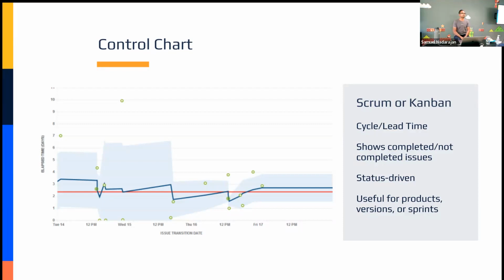That's what your lead time is going to tell you. So it gives you that little bit of extra information to say, how much time is going to be spent in this leftmost column before it gets prioritized and it gets moved up and then it gets picked up by a developer or another team member. So that's really the caveat between the two. They're both very important metrics. And this control chart will help you identify that.